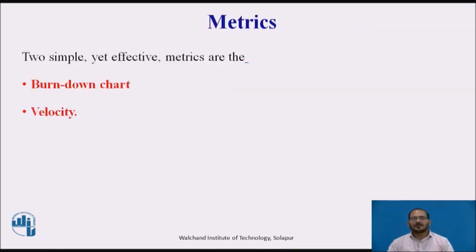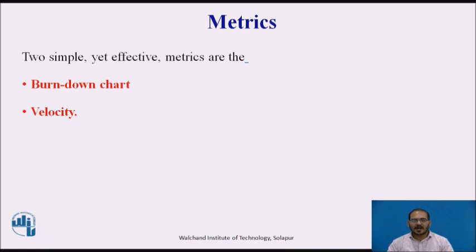Does the product meet the needs and expectations of the end user? This question is the ultimate measure of success for any project. Metrics are also useful to the team in tracking progress and efficiency. Two simple yet effective metrics are the burndown chart and velocity. Both are based on story points, which is a measure of relative effort or difficulty required to complete a given story.